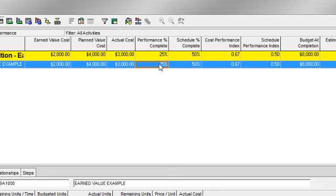Performance percent complete is what has actually been accomplished when we status our schedule. It is used in the calculation of earned value. In this instance, we've earned $2,000.